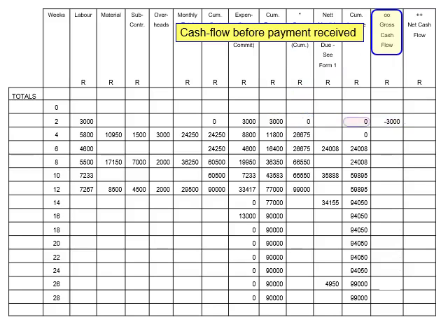Amount for cumulative income due column in week 2, 0, minus the amount under the cumulative expenditure column in week 4, 11,800 Rand. Record the answer, minus 11,800 Rand, under the gross cash flow column in week 4. We repeat the calculation for week 6, resulting in 0 less 16,400, which equals minus 16,400 Rand, and week 8, resulting in 24,008 less 36,350, which equals minus 12,343 Rand. Continue with the calculation until week 28.